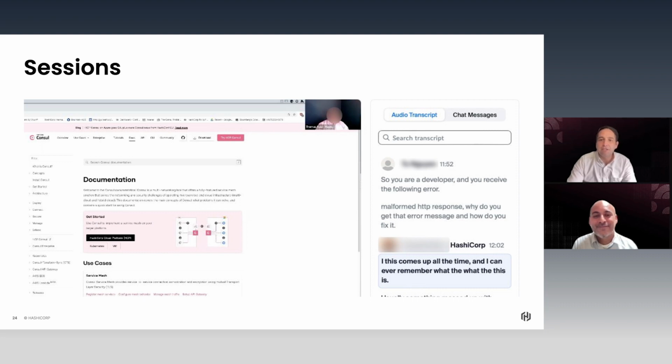When we held each session, we began by reading a script that instructed the participants and set the terms of our interactions. We wanted to limit our own interactions to asking questions and prompting participants to talk through their decision-making process. We scheduled 30-minute appointments, reserving 5 minutes for instructions and explanations, 20 minutes for the study, and 5 minutes for closing thoughts and comments. Sessions were held on Zoom, with participants sharing their screen as they responded to questions.